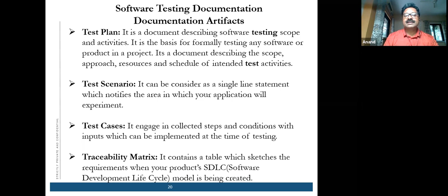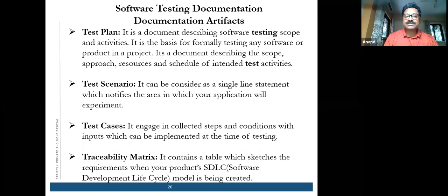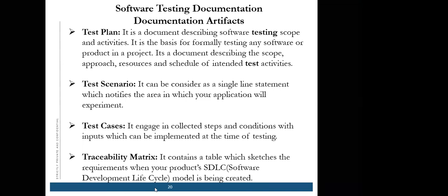Right. So, coming to test plan, a test plan gives a roadmap for the entire testing activity, right? So it can be environment, deliverables, entry criteria for the testing, when we have to start the testing, when we have to end the testing, the budget or the team size, what is the scope of testing, what are the environments that we need to test. Meaning the test manager, the management says, you need to cover the testing on both Chrome and Firefox. Let's say a simple example. So then it has to get documented in the test plan.